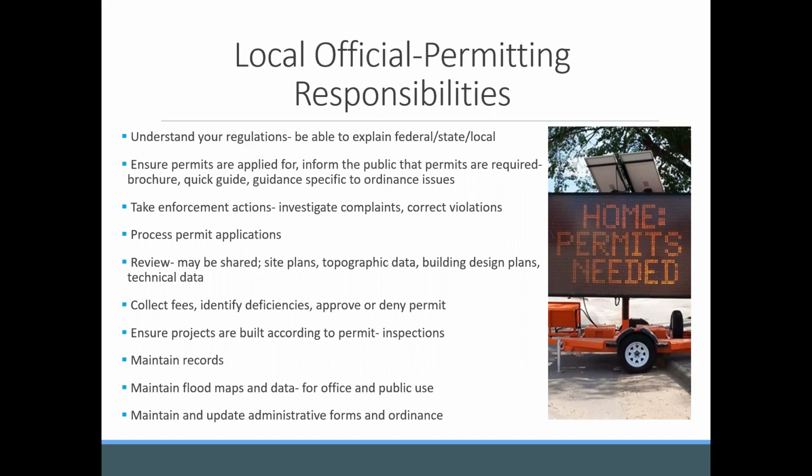So doing inspections, as I mentioned, is something that should be part of your permit process, and it should say on your permit that they are giving you permission to enter the property to do inspections, and hopefully you can work out a time with the project timeline that works. Maintaining records in perpetuity, so you want to maintain all of these records indefinitely. And so we will probably be asking for them if we do an audit on the community floodplain program. So we have any number of ongoing audits throughout the year, and we start new ones each year.